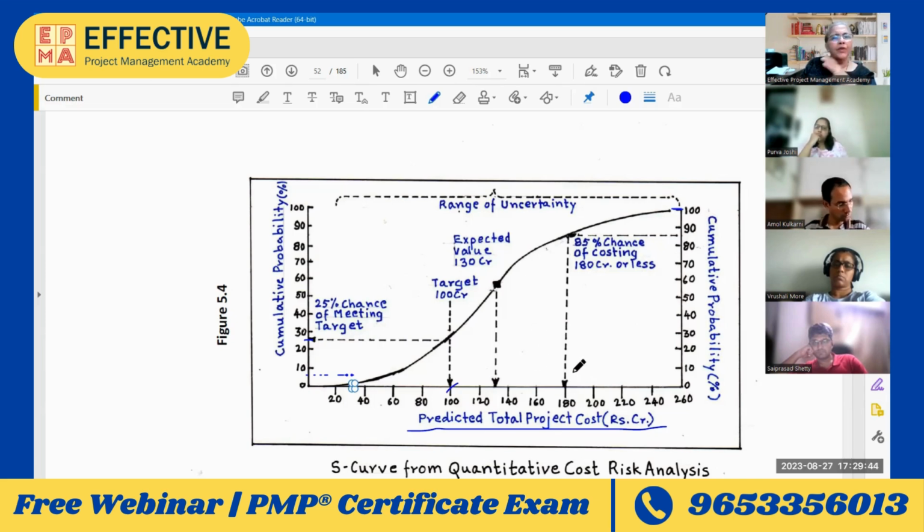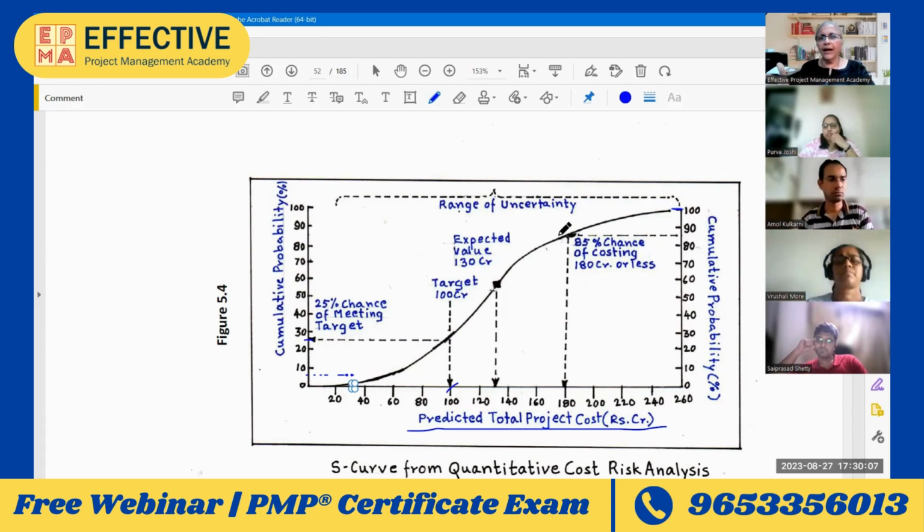What do you think, Vajanti? We cannot give you 260. We don't have that kind of money. What happens if we give you 180 crores? Can you tell us? So, working it out, I will say, okay, I have about 85% confidence. That's good enough. 85% confidence is high. Let us say that your budget is 180 crores, and if you need later on, we are there. So, right now, we will freeze the budget at 180 crores. So, that is how budgeting for large projects would typically happen.